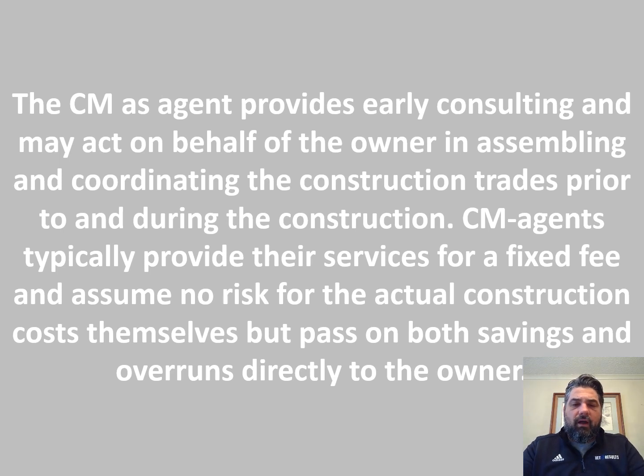And so a lot of times they will be involved in both design and construction. They come on to the project typically in late schematic design, early design development. And so they typically have a fee for their preliminary pre-construction services.